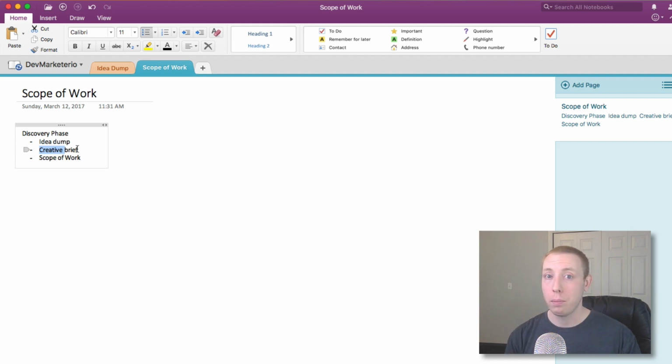So it's a very important process, and you definitely don't want to push through this discovery phase, because if you do, what's going to happen is in the later stuff, you're going to end up screwing up and having to come back and redo something. And that was one of the most valuable lessons that I learned in this process, was how important it really is to have this discovery phase. And when you skip over it, you find yourself having to come back and do multiple revisions, and certain things get skipped over.